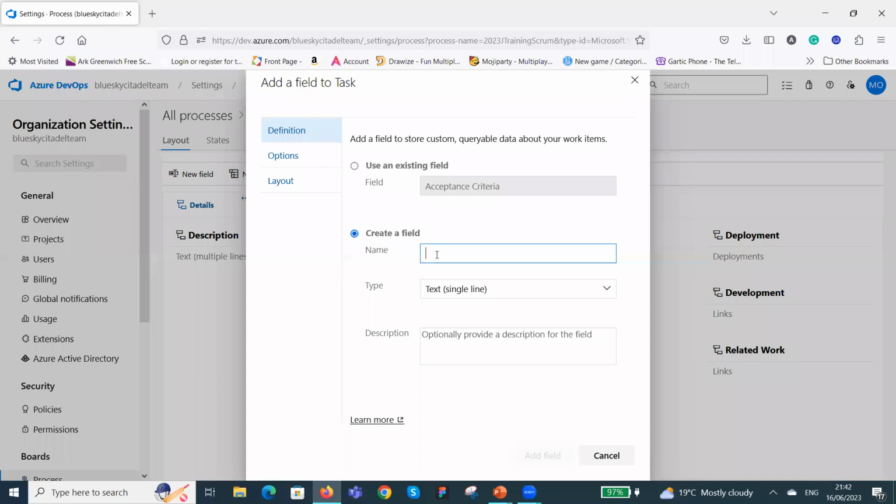And then we also want to create a field for actual hours. So at first I estimated it was going to take me 3 hours to finish it, but I ended up using 5 hours, or I ended up using 2 hours. So we don't want it to carry a 3 hours, which we know we either use less hours to do or more hours to do. We want that transparency to show on our board. Remember, it's a collaborative tool and it has to be transparent. Whatever you do on it has to be transparent for everyone to see.